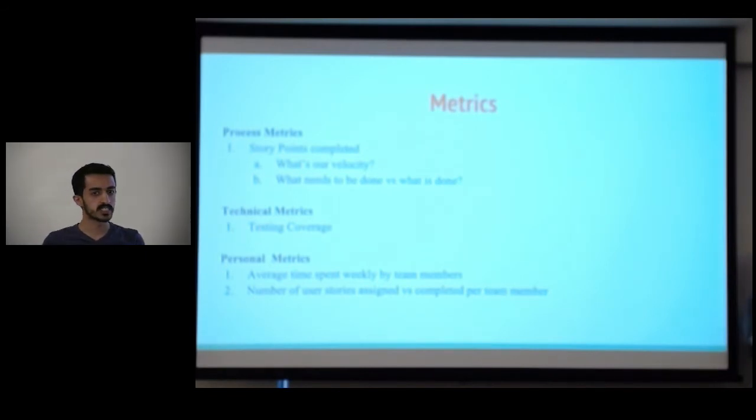This we have been collecting since week 1. We have been collecting the time and tasks we have been doing and times we have been spending on these tasks. And also later on we started to collect the number of user stories assigned versus completed per team member.